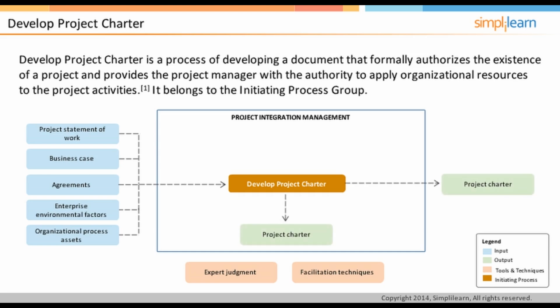The only output of this process is the project charter. Let us try to understand what the project charter might contain. The project charter usually contains the high-level project requirements, and it should be created by the project sponsor and handed over to the project manager. The project manager can do the groundwork to prepare the project charter, but it must be signed by the project sponsor or somebody in the performing organization who is higher in authority than the project manager.